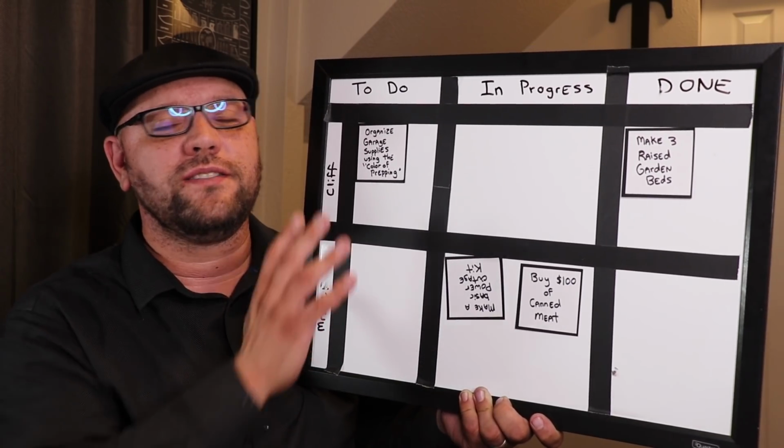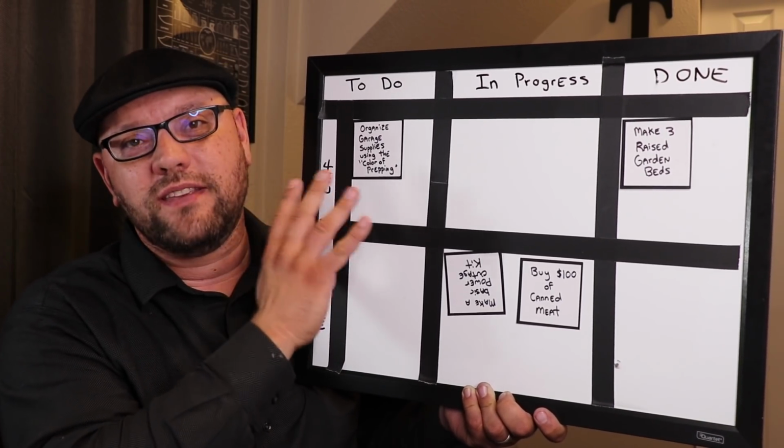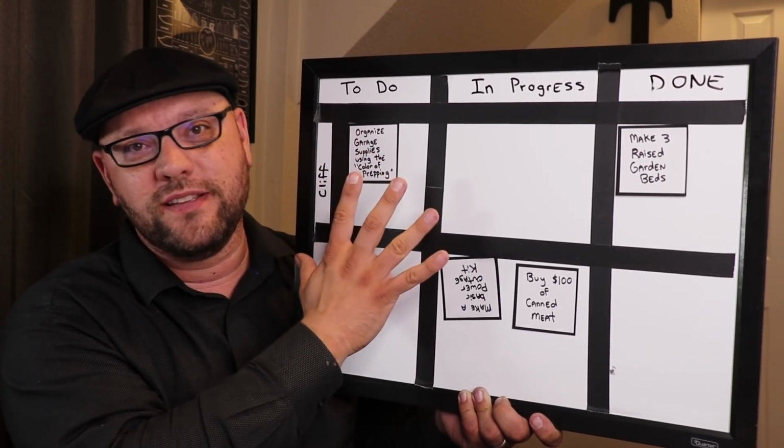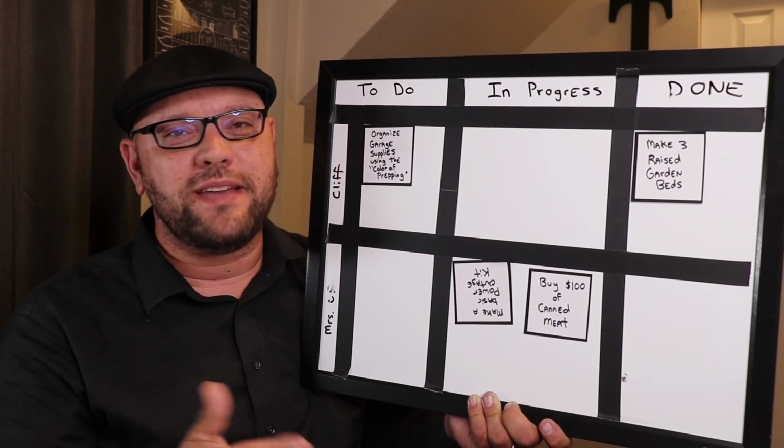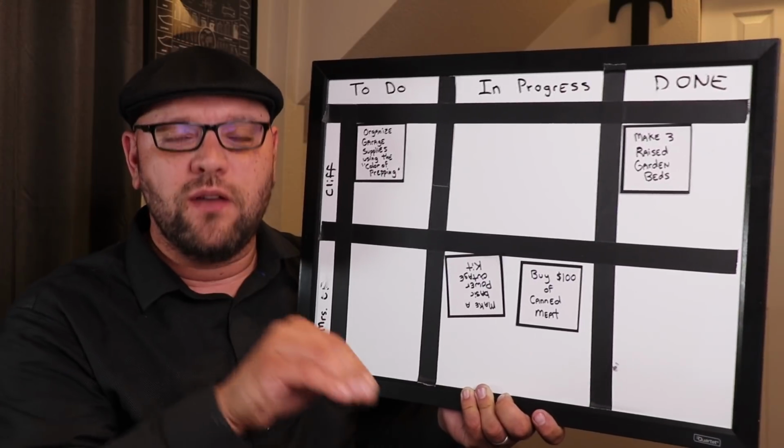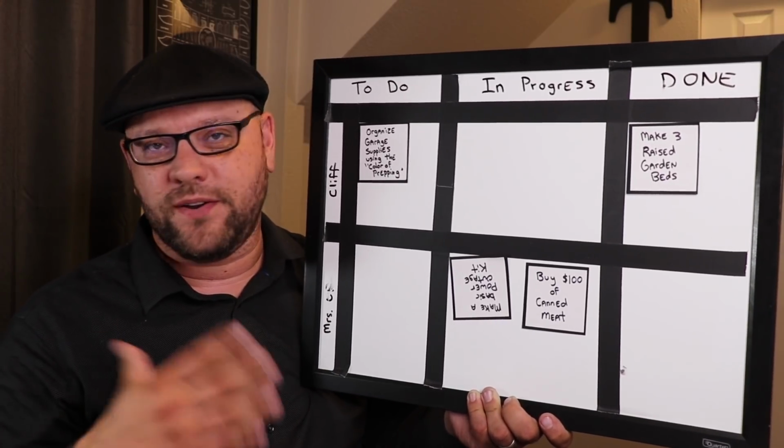You'll just want to put all of those in what's called the backlog, and then the ones that you want to get done first, you're going to move into the to-do list for that sprint. So having some kind of sprint planning meeting is a good place where you can actually think about what you actually want to get done for your overall projects.